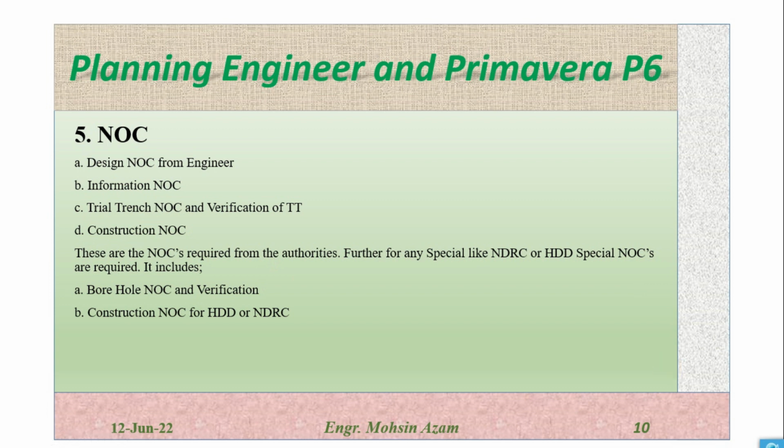Further, if any special NOC is required, like for the NDRC or HDD, special NOC will be required. For example, if we have to do any NDRC, which is non-destructive road crossing, first of all we have to do the boreholes. For the boreholes we need the borehole NOC, and after getting the borehole NOC we have to do the verification, and after this we will submit the construction NOC, and after getting the construction NOC we will proceed with the NDRCs. So these are the special requirements which we have to complete.